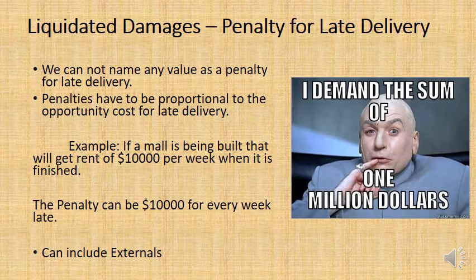Now, you can have a penalty for late delivery. That's a penalty for poor time management, but equally you could have a penalty for poor quality management, and that is a type of liquidated damage too. Let's say I'm the Ministry of Electricity, and I'm tendering out to prospective contractors work to build a new renewable energy wind farm. Now, in the scope of works, this wind farm is supposed to produce 25 megawatts of energy.